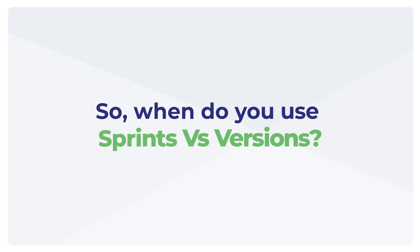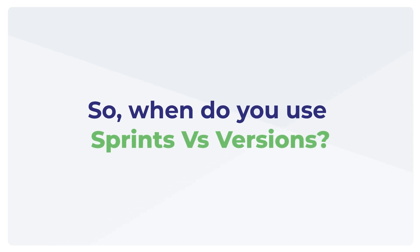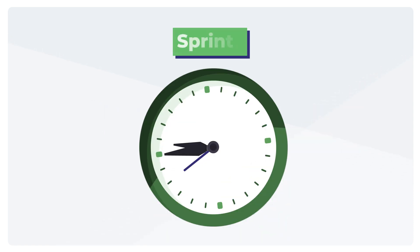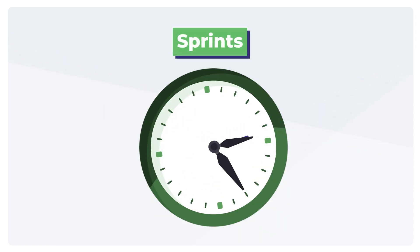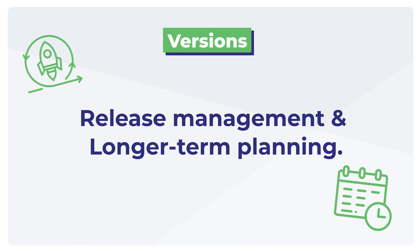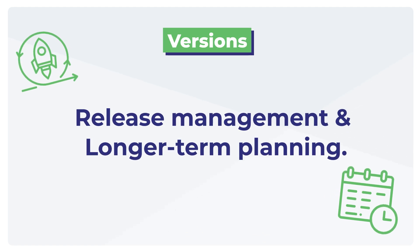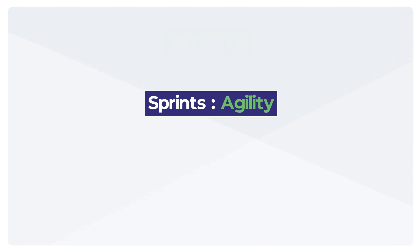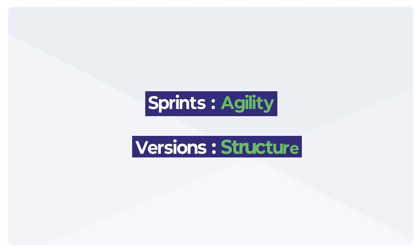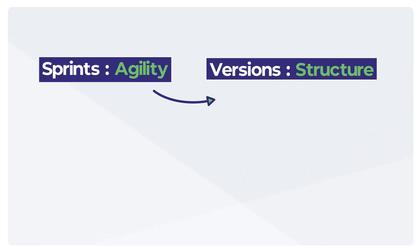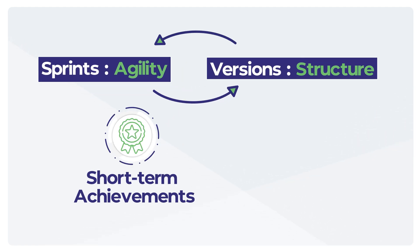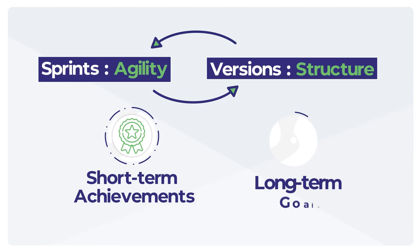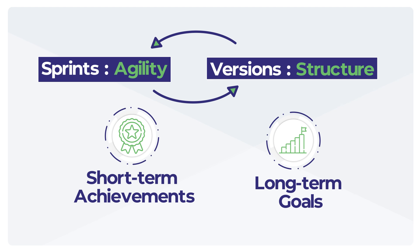So when do you use sprints versus versions? Sprints are for day-to-day development and maintaining momentum. Versions are for release management and longer-term planning. In short, sprints drive agility, while versions provide structure. Together, they help balance short-term achievements with long-term goals in JIRA.